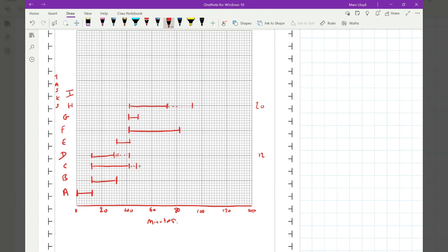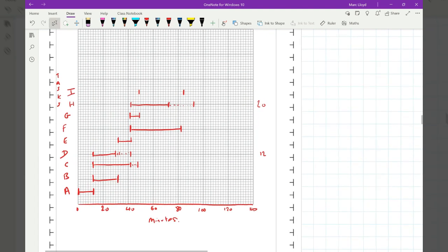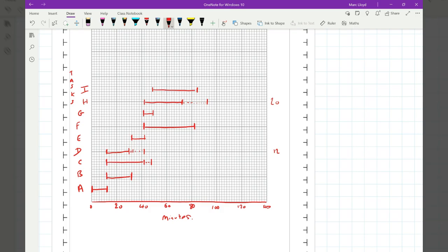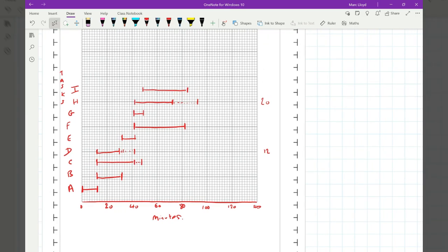Right, 49 for the next start time. That's after G, so I is in there, and then the length of time is 35. 49 plus 35 is 84. 82, 84 goes there. Across it goes. No float time there. J takes 4 minutes from 82. Small one. That can finish at 92, so 82, 84, 86, 88, 90, 92.